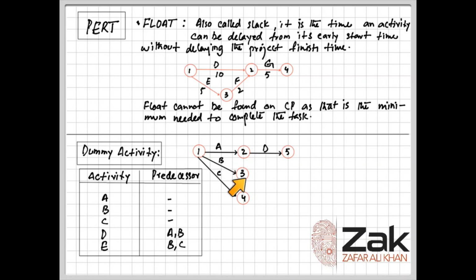In order to make this logical progression okay with this PERT chart, I would have to put this dashed arrow from B to A, which is telling that this is a dummy activity, meaning that after A and B, activity D can be started. So this is actually the logical progression from node 3, to make this D happen afterwards.